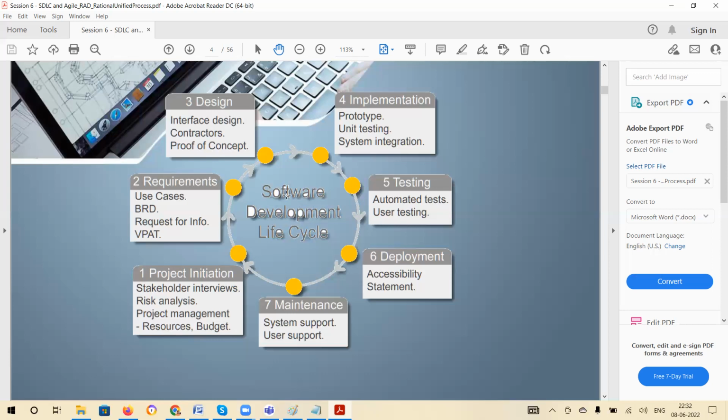The design phase is where the SRS document is written. The technical team, mostly senior people, will create class diagrams, ER diagrams, and proof of concept. POCs are done when, let's say, it is something that you have not done before. So before you say yes, we can do it, to your customer, you want to develop at a smaller scale to see whether you can work on it or not.